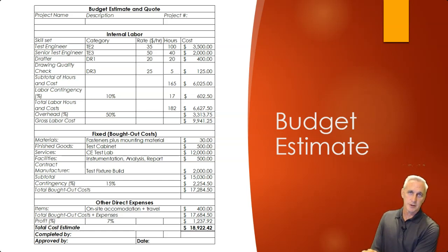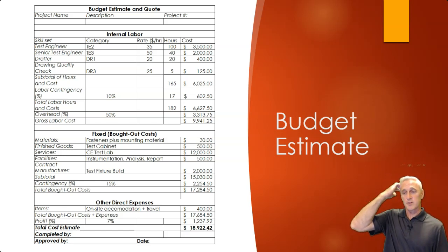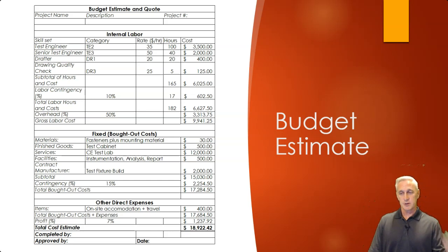Typically, this would be an internal estimate, something that you could show to management, all those types of things. And usually they're involved in the process, particularly for the approval piece, because you want to show that you've put in some profits and you have made some contingencies. Now, would this ever be used in a quote? Could be, sometimes, as long as it's acceptable and is normal practice in that type of industry. Again, like the government, when you have certain things, they expect to see a profit line and probably some contingency planning, particularly if it's high risk.